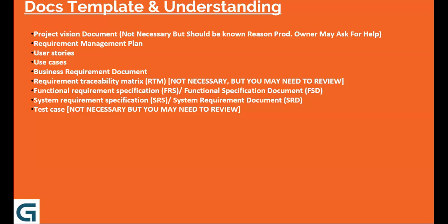But if it requires a lot of development time, if additional software has to be acquired, and we would need someone with that skill, then altogether that has to be charged, because it's a new requirement that is being discussed and taken. So that's why it's a very important document. But on practical grounds, very few organizations keep it.